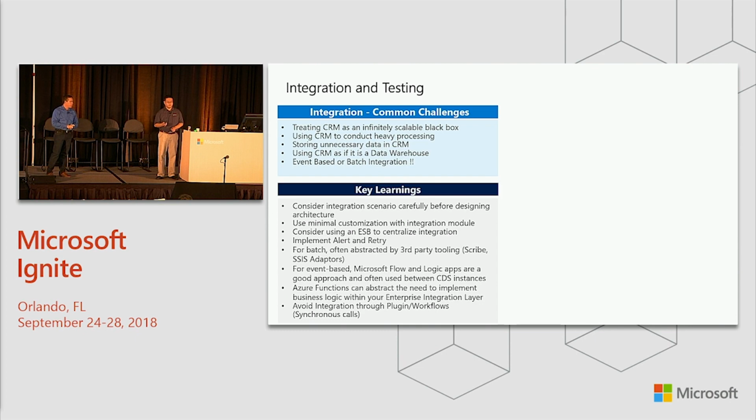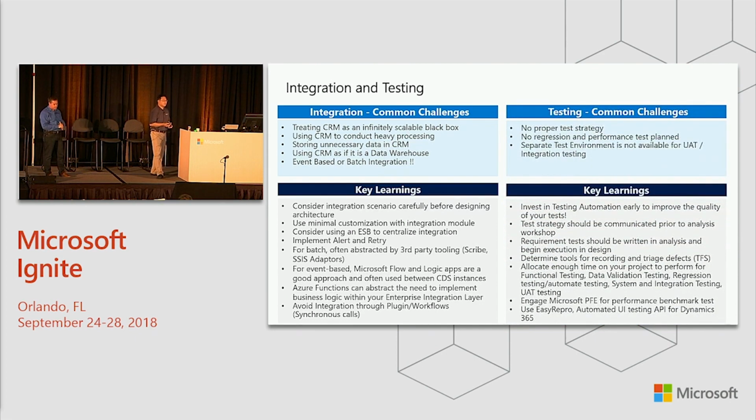Yep. Thanks, Marty. So let's move forward. Another common challenge that we have seen is that when a project is tight on timeline or tight on budget, the first area they cut is testing. Right? I would say that's a big mistake. Hopefully in your projects, you really need to spend some time on testing strategy and making sure that you have a good testing plan in place. And a lot of customers, what we have seen is that they only test the feature that they fix. However, they are not testing the entire solution end to end.